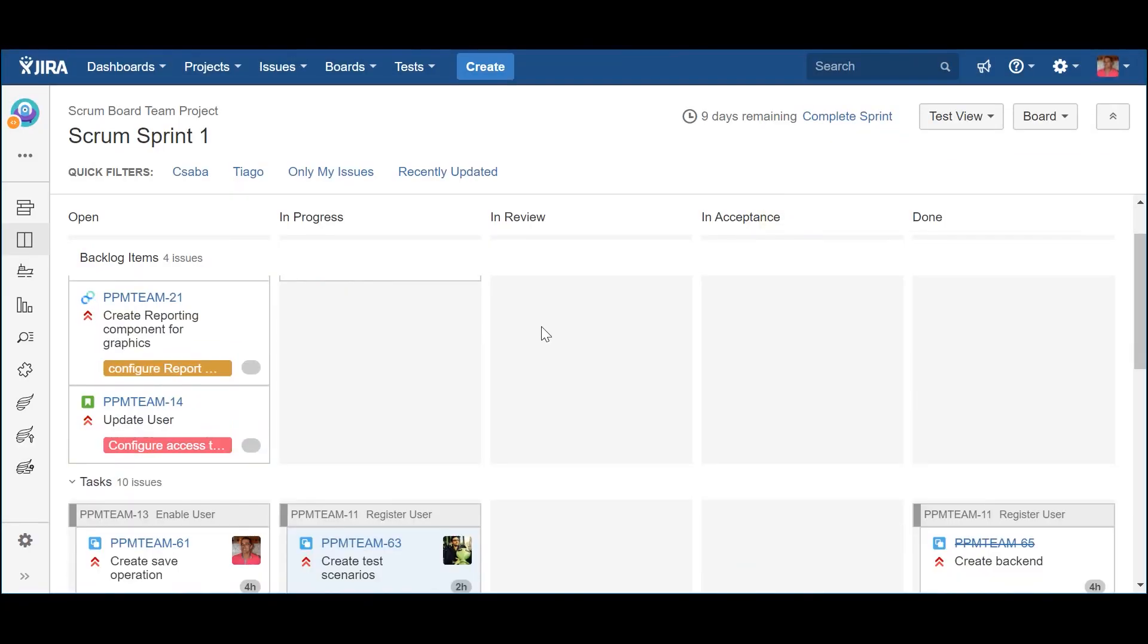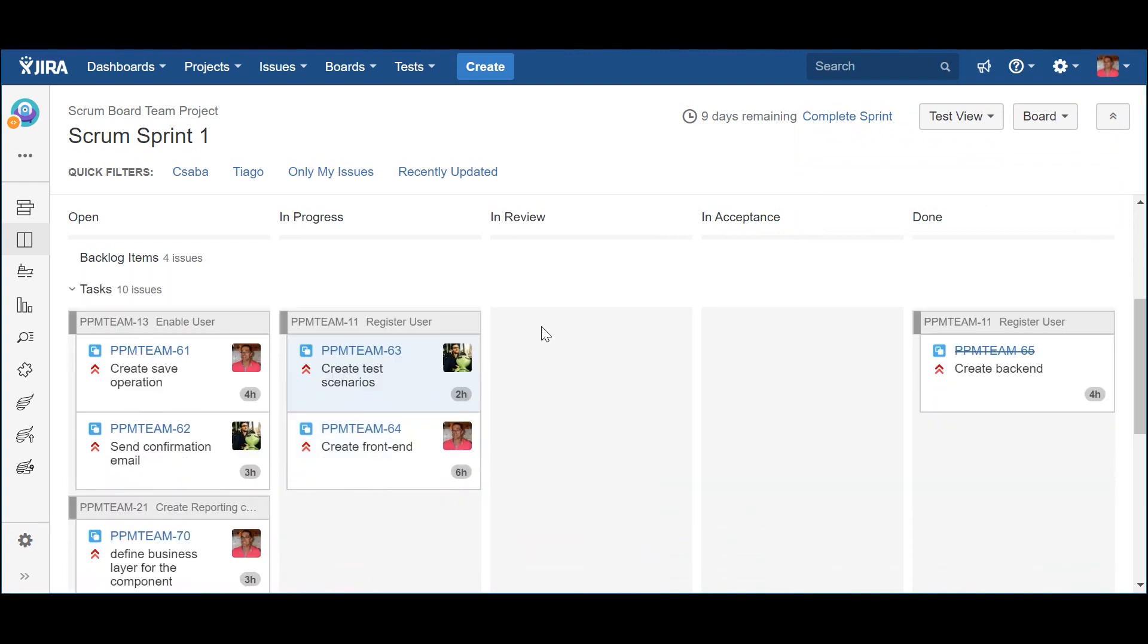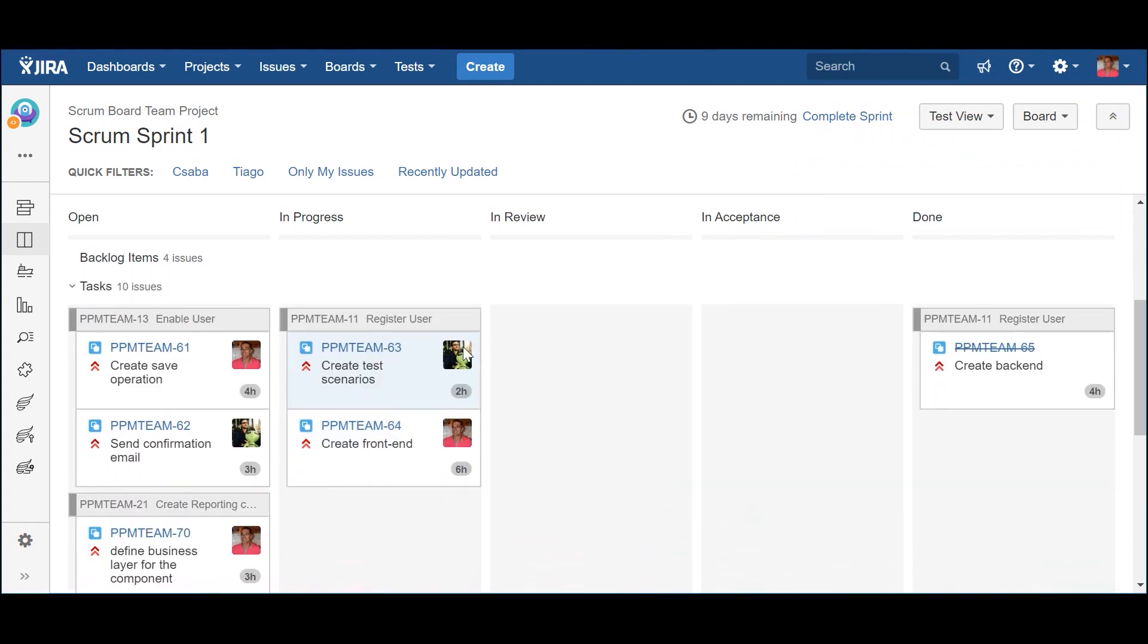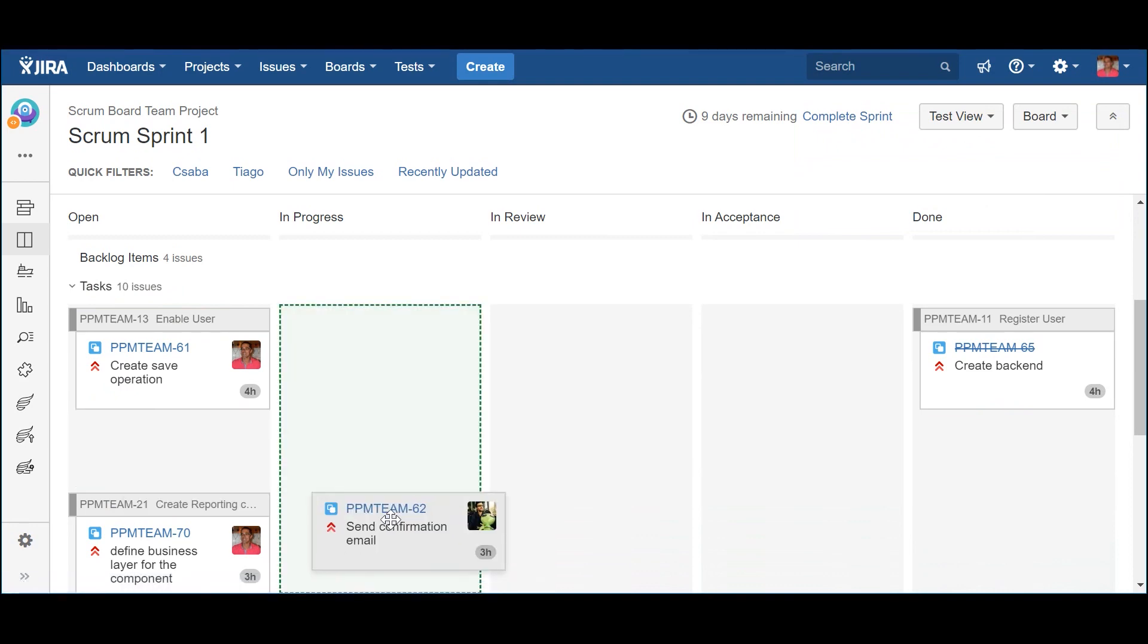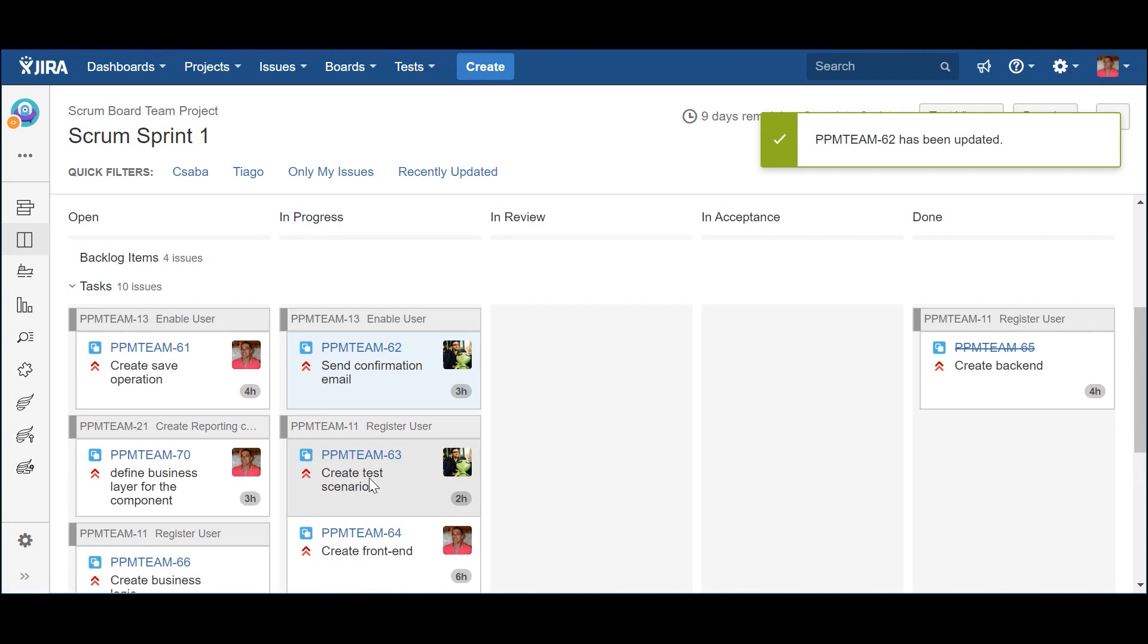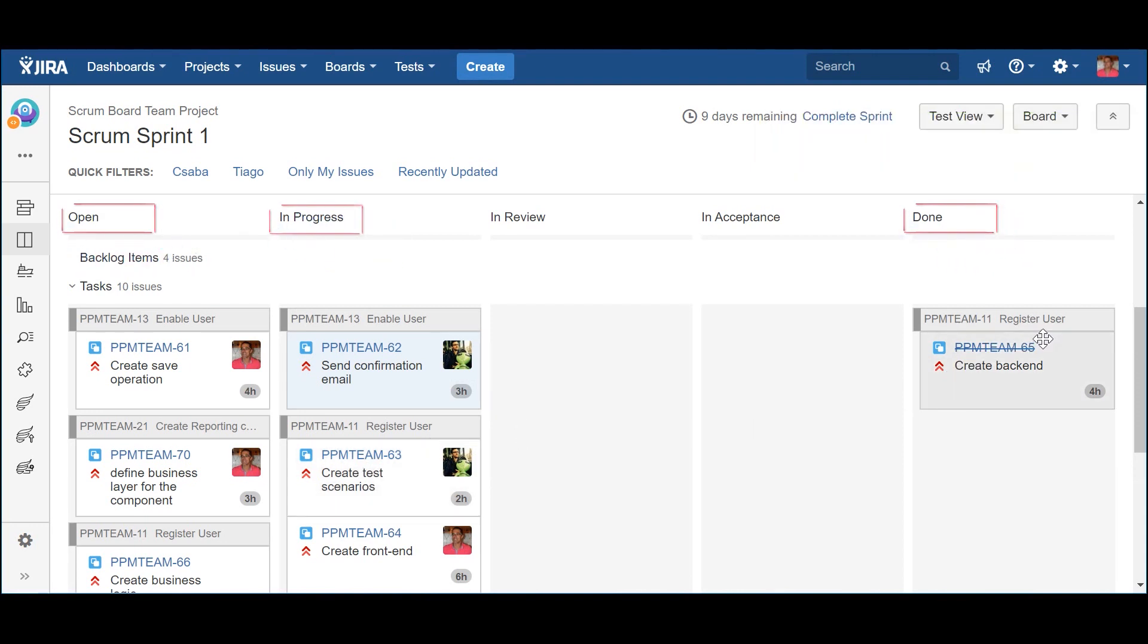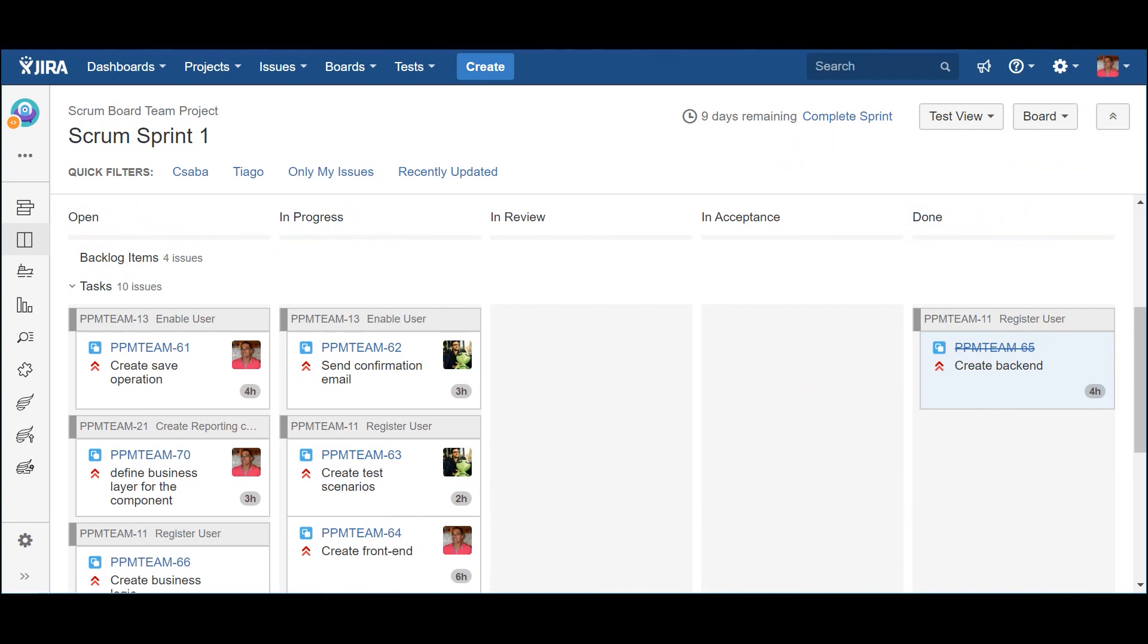In the second swimlane, you can see the several subtasks that belong to the backlog items that are part of the current iteration and represent the work to be done. As you remember, they only use a subset of the columns, since their life cycle is simpler. In this case, Open, In Progress and Done. This is why JIRA won't let me drag the subtasks to some of the columns. They are not mapped to a status that is part of the subtask life cycle.